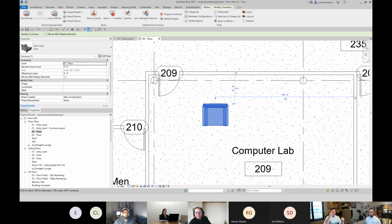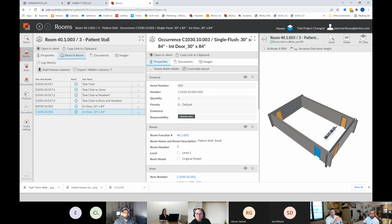And then you can click on that. You can say, okay, show me what facilities those are in, or show me where my imaging departments are, or, getting down to the equipment level, show me where I have a Siemens CT scanner of this model. And then when you really start to get, depending on how sophisticated the owner is and working in conjunction with the contractor, with the Power Dashboard stuff, if you have multiple projects going on at the same time, and this is what Kaiser's doing, and they know that they're going to purchase 50 exam tables for this MOB and 50 for another and 50 for another, why are they purchasing 3 purchases of 50 when they can use purchasing power and buy 150 of them?